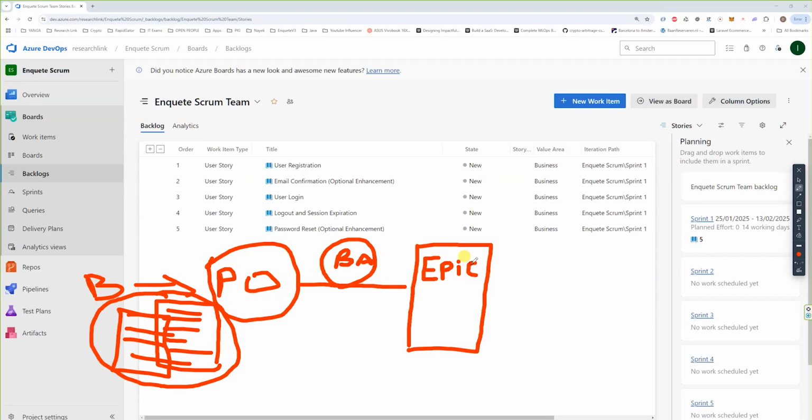So, but it chops it down to a little bit of manageable parts. Then you take each of those manageable parts again and break it down. So let's go back. You take one of this epic. This is epic one, epic two, epic three, and you break it down into what you call features. So maybe this epic has 2 features, this epic also has 2 features.